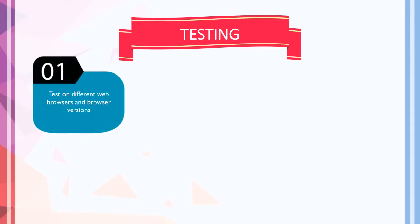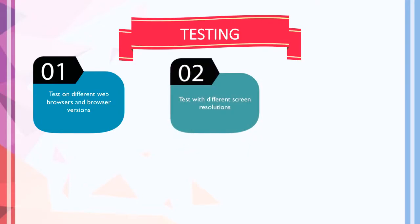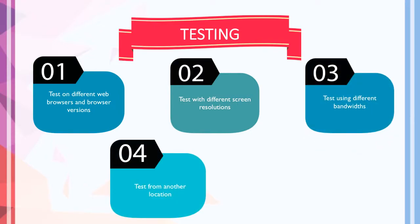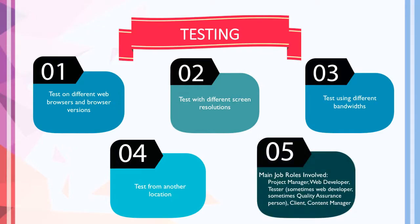For testing the website, the steps include: test on different web browsers and browser versions, test with different screen resolutions, test using different bandwidths, and test from another location. The job roles involved are project manager, web developer, tester or quality assurance person, client, and content manager.